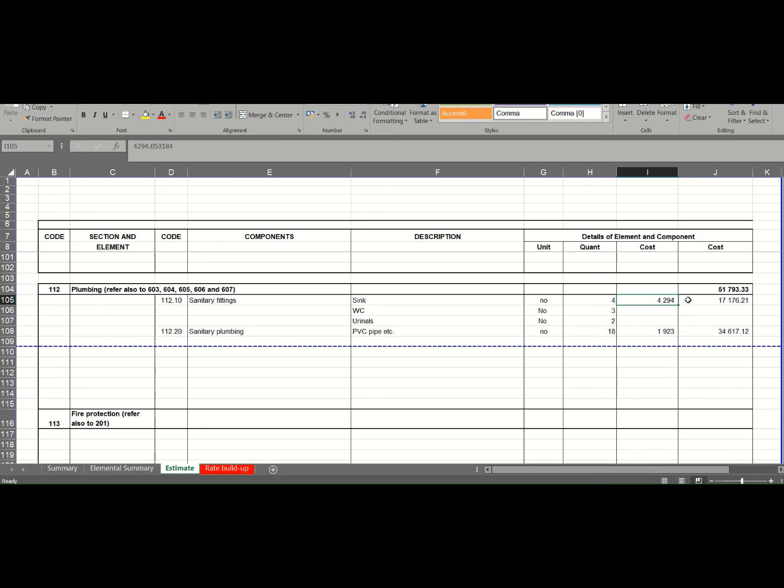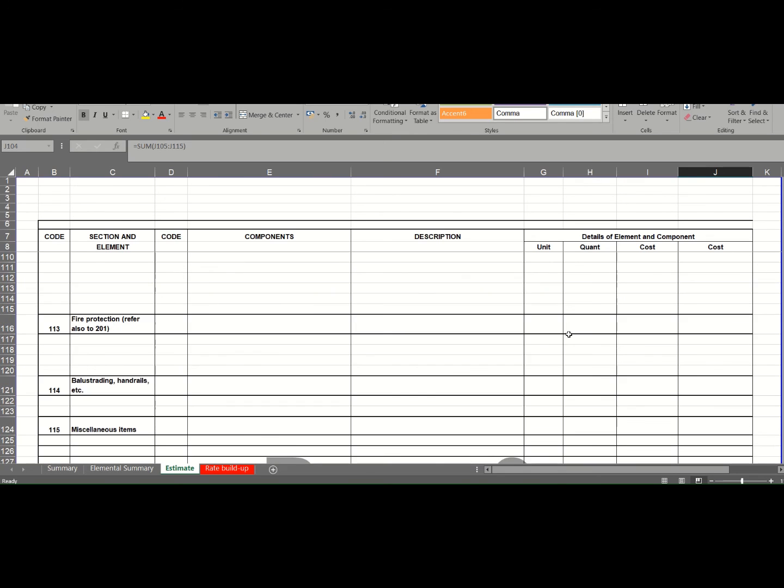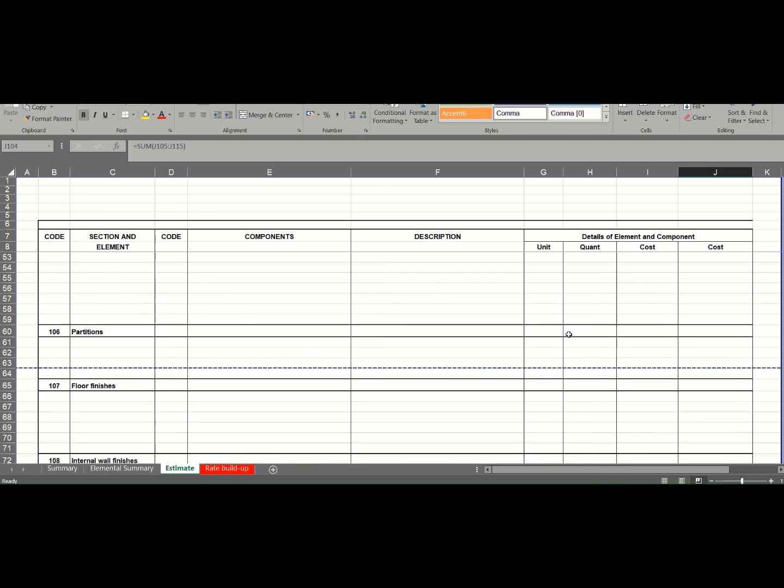I'm just going to use the same one that we used here, to get to our plumbing and drainage installation. A very nice check here is also to calculate what your rate per square meter is, and to compare that maybe with your historical bill, whether it's in the ballpark or not. Okay, so I think that's more or less it.